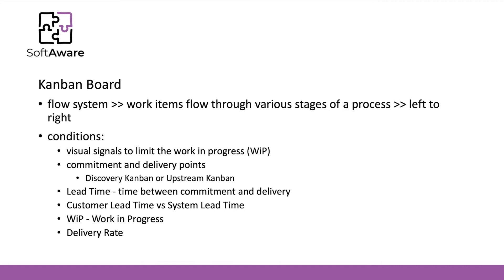It should be clear where the commitment and delivery points are. There is also the possibility to include discovery Kanban and upstream Kanban. Then comes lead time — metrics include not only the lead time, the time between the commitment and the delivery, but also the differences between customer lead time versus system lead time.